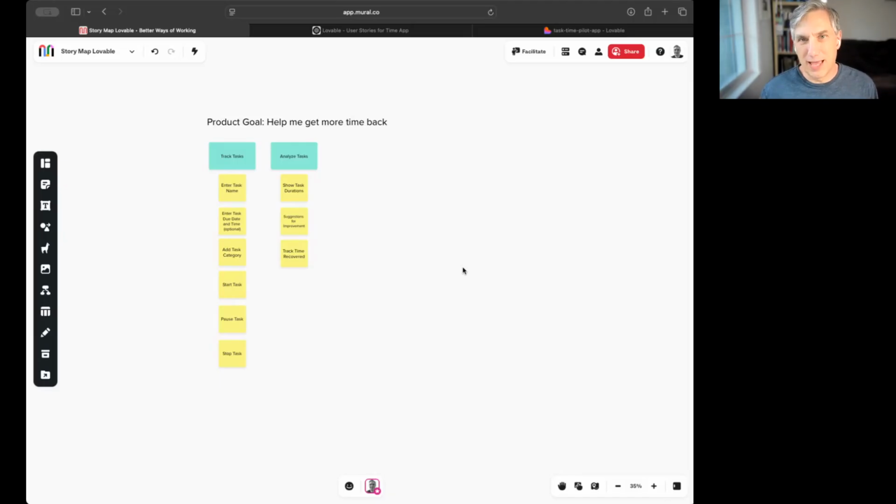So if you're familiar with Agile, one of the techniques that we use is a user story map. It's like a two-dimensional backlog in a sense, where horizontally we lay out the high-level activity of the user, and then vertically under each one of those activities, what are the steps that the users are going to do. It's a very popular technique. If you want to see a video on me expanding that, let me know in the comments down below.